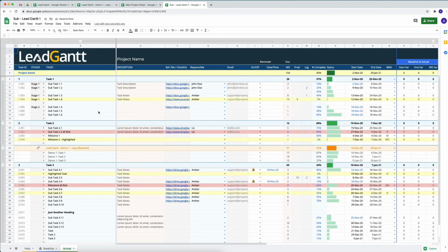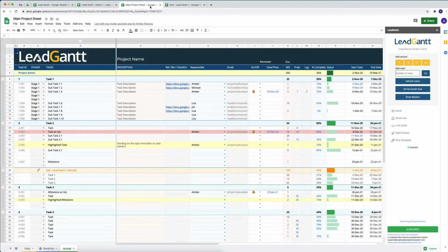So we want to make sure that all these details are taken care of when we are making these changes or starting these projects. But the best practice is that you set up a baseline, and all the subsheets that are going to start or work or get connected back in there are all at baseline, and you start the project from the main project sheet so that all connected baselines have their project started in them as well.